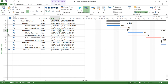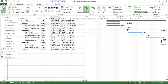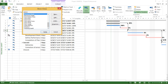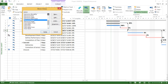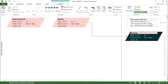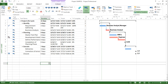If I go to the format tab it shows me the same set of menus as the Gantt chart tools — the format options for the Gantt chart tool do not change under the tracking Gantt. So this was about tracking Gantt, which helps me show the percentage completion of each particular task. I also want to share some more views available under the Gantt chart drop-down: if I click on 'more views', there are various other views available. For example, I can click on a relationship diagram or network diagram, hit apply, and it will change to that view. Let me get back to my basic Gantt chart view. So this was all about the views — the team planner view, timeline view and tracking Gantt view.